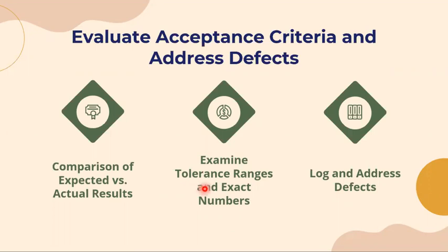The tolerable range for finance, in my experience, is just 20%, so 20% above and 20% below. Meaning if it goes above budgetary requirements, only 120% is tolerable, or if below, only 80%. If it goes far beyond the tolerable range, then it should be justifiable. If not, you will have to make endless explanations.